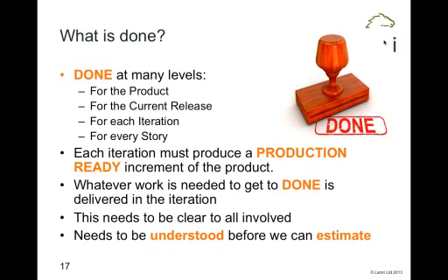It's very, very important, and this also becomes important when we're working with third parties. If I've got third parties involved, then to a certain extent, meeting the definition of done is how they get paid. So getting a clear and good understanding of what done is very, very important for that.